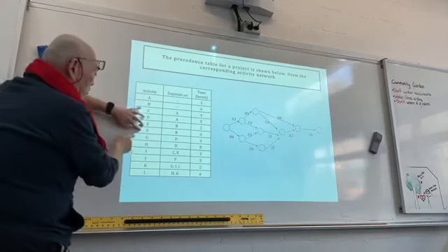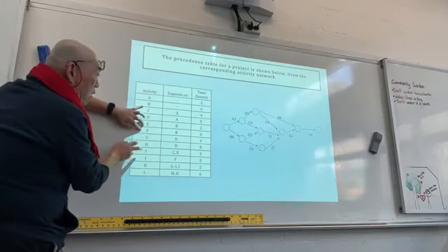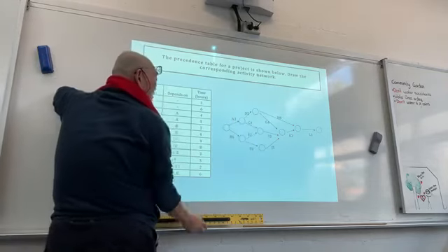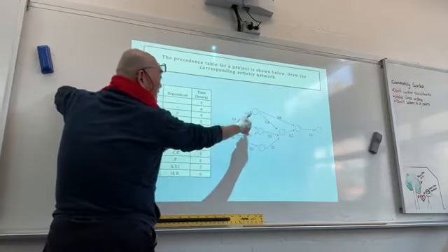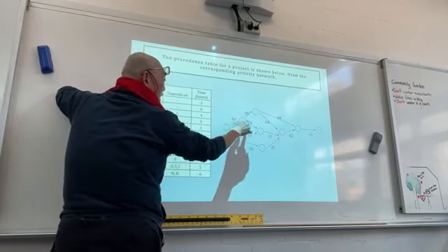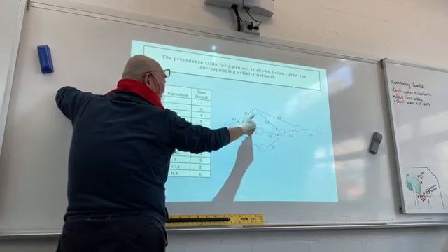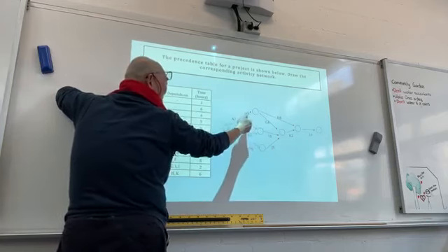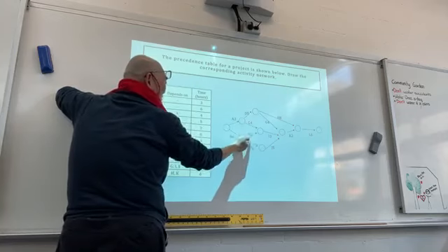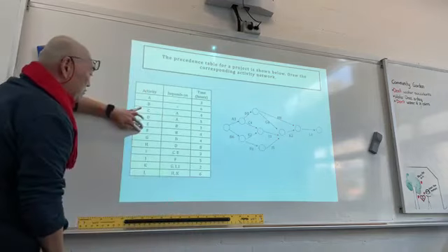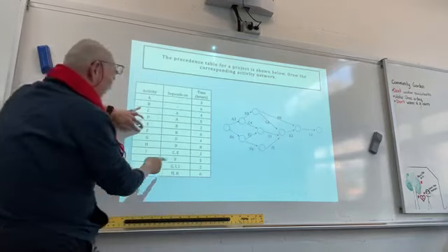Now, looking at G, H and I, you know I has predecessors C and E. So therefore, you really need to have C and E close together. So with C and E close together, you have it sort of inside the two arrows, one below this arrow, this one above that arrow, so you can connect that through to that node. And you've got your I.